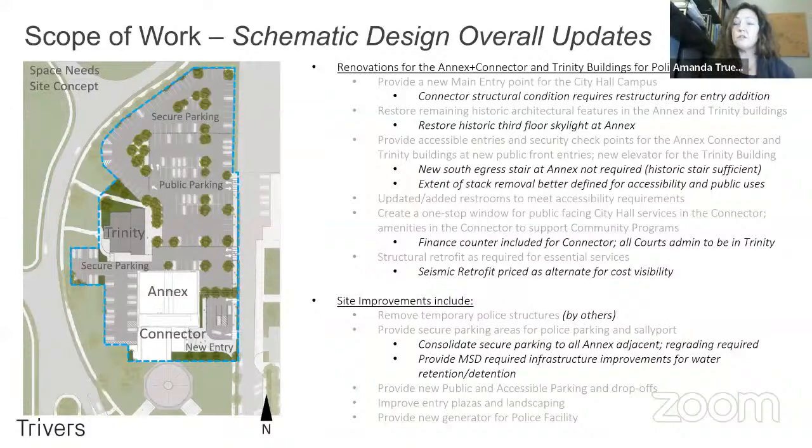So all the courts functions will now happen solely within the Trinity building. It didn't really change the program, it just changed who's going where in that one-stop space. So the number of transaction counters are the same. And then in this round, we've also priced the seismic retrofit scope for the annex as a separate number so that the city has visibility on where those costs are trending.